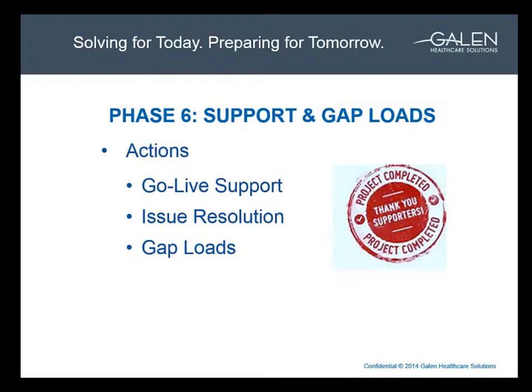So, issue resolution: post-conversion go-live, any issues that were identified that were unresolved are tracked. Typically what I find is that there's discussion at that point as to whether the issue was something that should have been detected in testing and wasn't. Is it considered in scope to fix, or is this something new and different that wasn't anticipated, and therefore maybe out of scope, so discussions take place, maybe some follow-up contracts to the conversion. This is all the details that get worked out post-go-live. It's very common for issue resolution to take place over a week or 2 after the conversion.